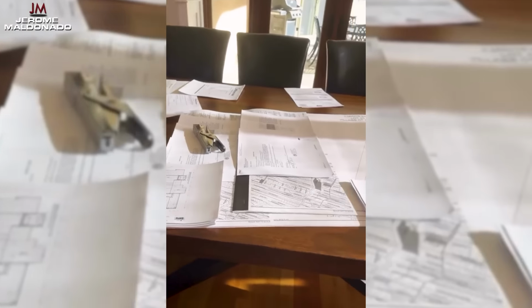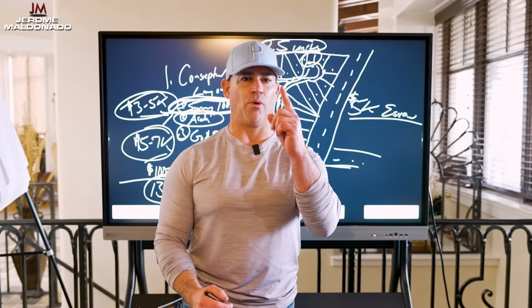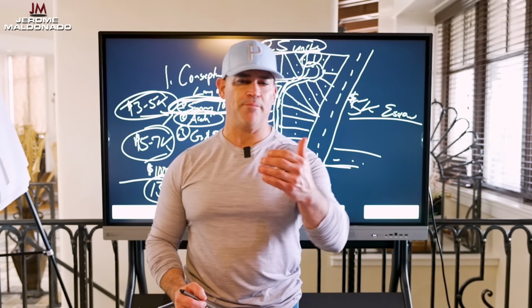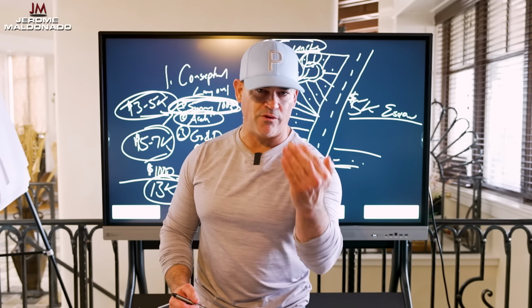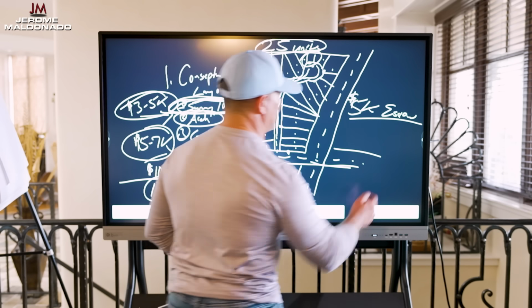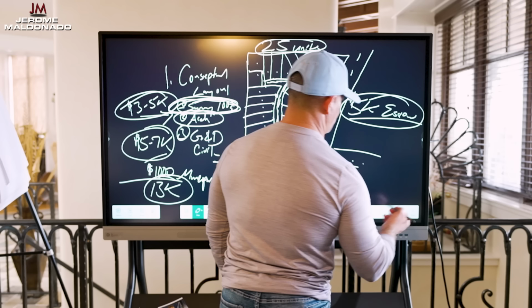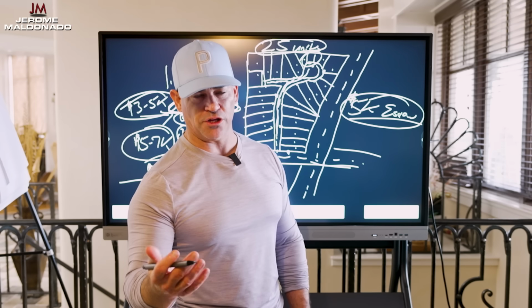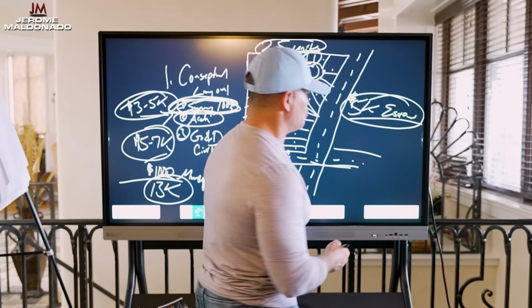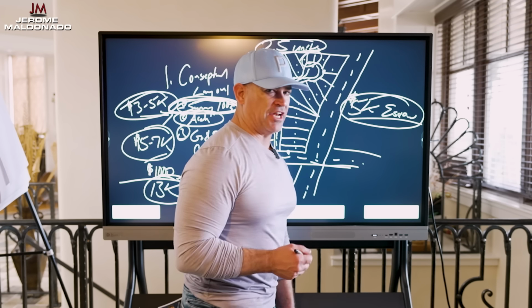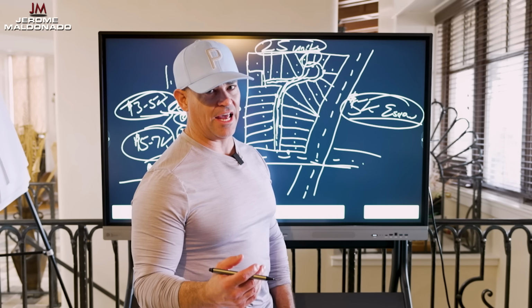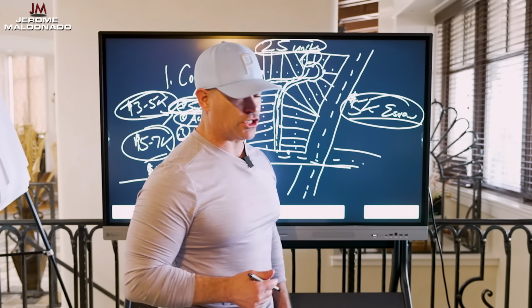Now, once you get this approval, ladies and gentlemen, this is your first breakaway point. You don't pull power, you don't pull water, you don't pull anything. You just get municipal approvals. And once you have all these municipal approvals, you have $5,000 in escrow. You control the land and you make those 2 contingencies dedicated towards the due diligence period and the closing. So now you go in, you ask for 60 days worth of due diligence and 60 days worth of closing time. That's 120 days, both contingent on full municipal approvals.